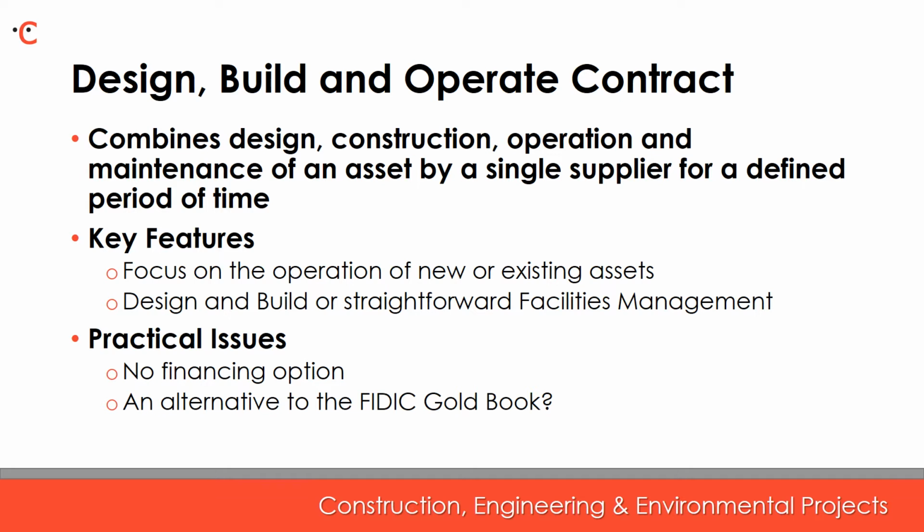If I can then turn to the Design, Build and Operate contract that has now been introduced. This contract intends to combine the procurement of usually disparate functions of design, construction, operation and maintenance together from a single supplier. The focus being on the operation of existing and new assets, with the design and build being the enabling part of that overall function.